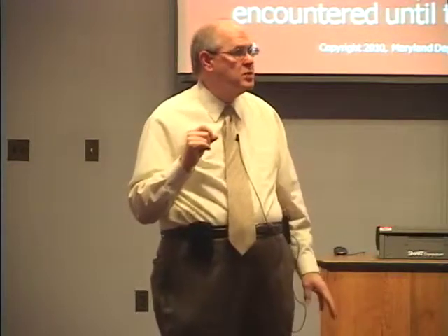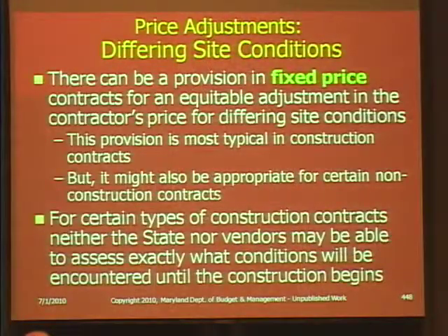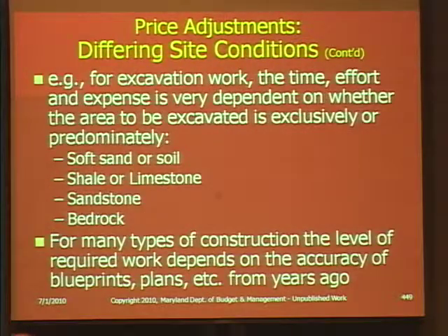For certain types of construction contracts, neither the state nor the vendors may be able to assess exactly what conditions will be encountered until the construction begins, and I'll give you a couple examples. If you're doing excavation work, the time, effort, and expense is very dependent on whether the area to be excavated is exclusively or predominantly sand, shale, sandstone, granite, something of that nature. What are you going to dig into? You can do a whole lot more excavating in soft sand than you can in granite.